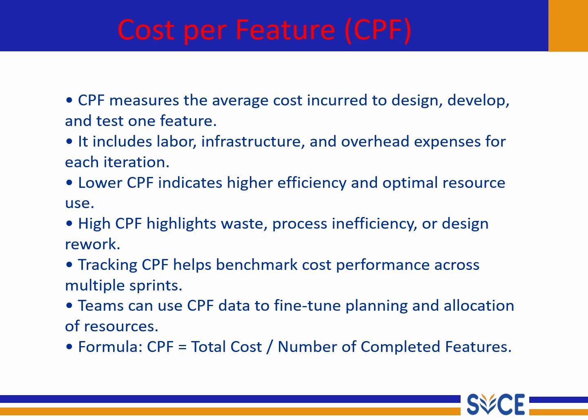CPF measures the average cost incurred to design, develop and test one feature. It includes the labor, infrastructure and overhead expenses for each iteration. A lower CPF indicates higher efficiency and optimal resource use. A high CPF highlights waste, process inefficiency or design rework.